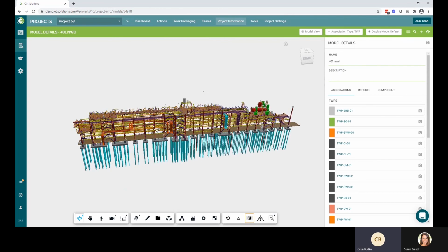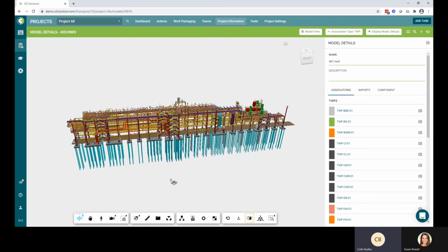So here I can see my overall test work packages. On each one of my installation work packages, I've provided a test system and a turnover system. We also have the ability to track test subsystems and turnover subsystems, but we can then utilize that information to track the % IWP completion of each one of these work packages. This helps drive our overall test work package readiness and status.